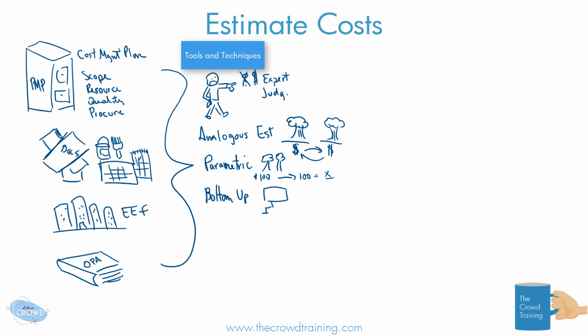And the bottom up, if you think about your work breakdown structure, and if it's broken down, and I'm going to use an illustration of this sort, but if I break things down far enough, and I could take each of these individual components and keep moving them up through the activities, to the work packages, to the control accounts, eventually then, if I have this amount of detail, I can then aggregate them in such a way from the bottom to a more fulfilling or more complete answer. And then that would be our bottom-up estimating.